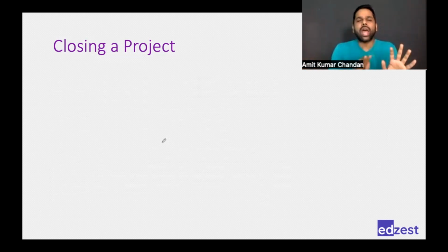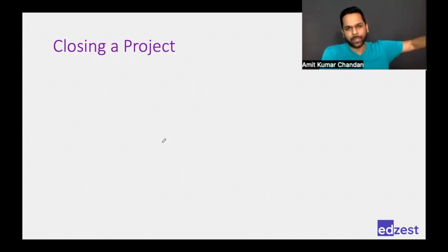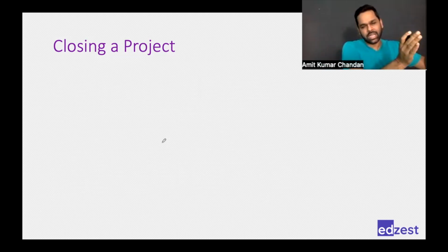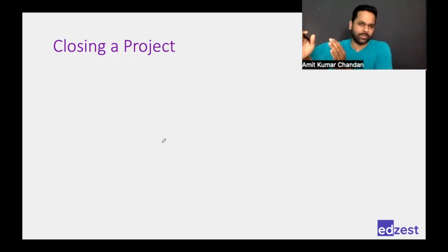Right? That's the whole idea of closing, similar to what we did in initiating. Okay, in the initiating, we just captured the information and created a project charter. Okay, we didn't do any detailed analysis of anything. That we did in planning. So it is very important to understand what happens at initiation and what happens at closure. Okay, closure is formally wrapping things up in the project. Okay, so what are the activities that we do in general?